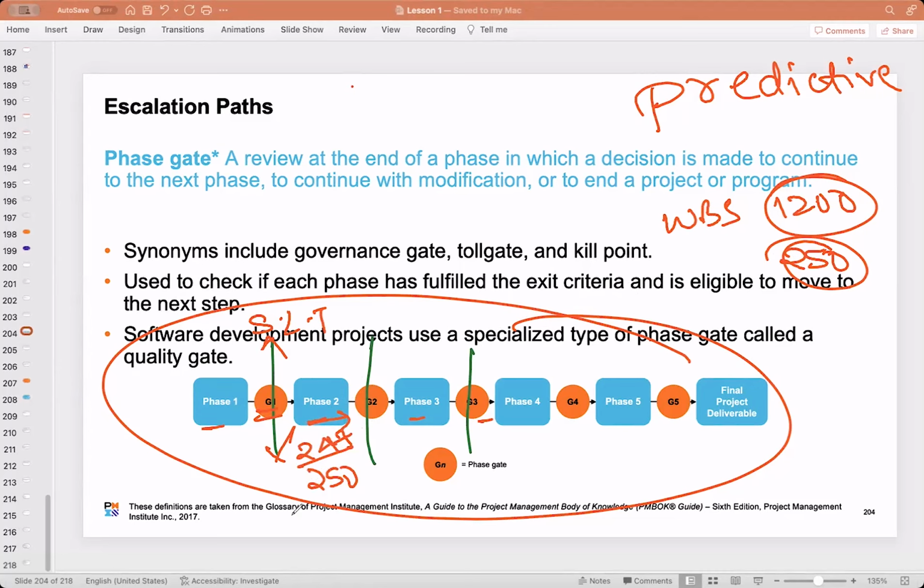And then they will either, if they are very strict, tell, no, we cannot allow you to phase 3. But if they are okay with the 3 deliverables, they will tell that yes, you guys can go to phase 3. Like that. Once you complete your gate 3 presentation, you add these 3 items also. Like that, they will give an instruction. Is that clear?